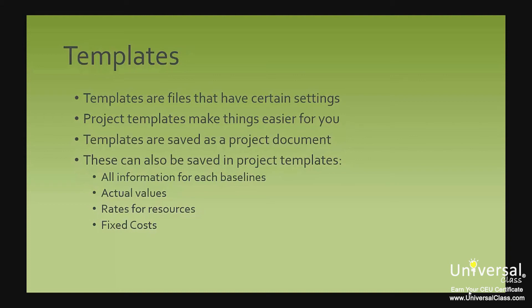Any template you create will be saved as a project document. You can save any of your projects as templates. This is especially handy to do if you use a lot of the same tasks over and over in different projects. In addition to tasks, these following things can also be saved in project templates.